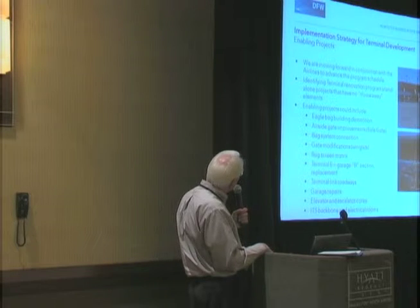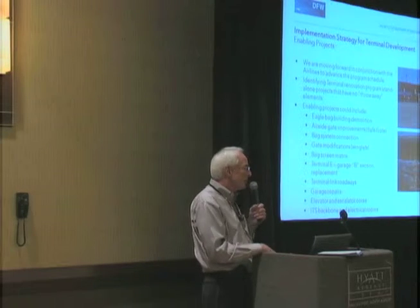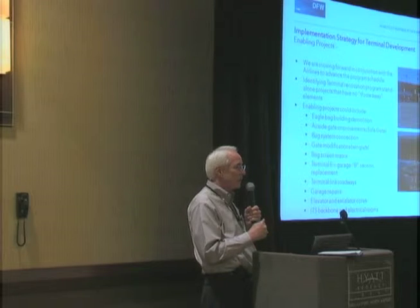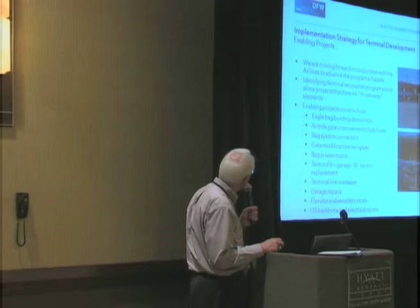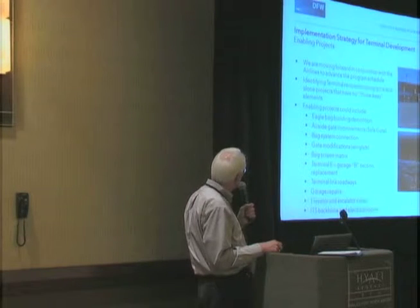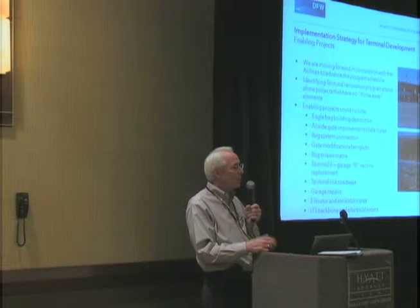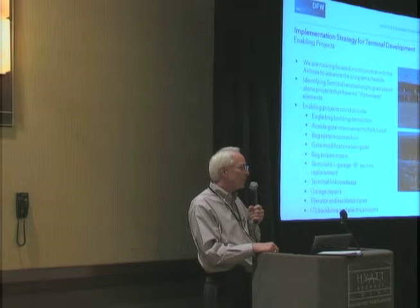What we're doing right now is we've got several enabling projects, that we're calling them, that allow us to get an early start on some of the construction activities that are going to allow us to then go into the main terminals when we get ready to do the major remodeling work and do some of the demolition and the shutdown of the terminal areas. What we're doing right now is we're looking at changing some configurations of the gate, of the baggage systems. We're looking at putting in some additional terminal link roadways. We're doing some escalator upgrades, and a lot of the stuff that we need to do that will allow us, when we're ready to go in and do a major remodel on the terminals, to be able to have some of these additional facilities in place to allow that to happen.